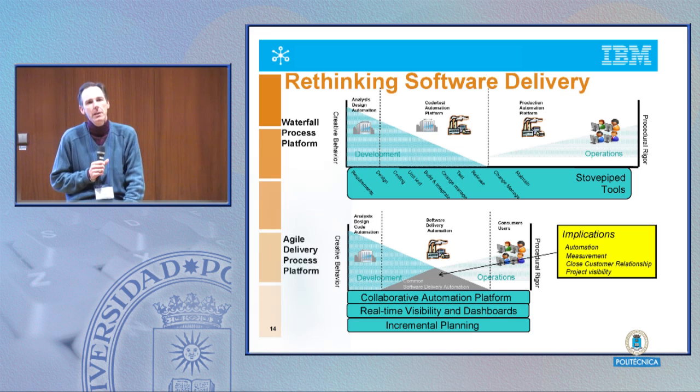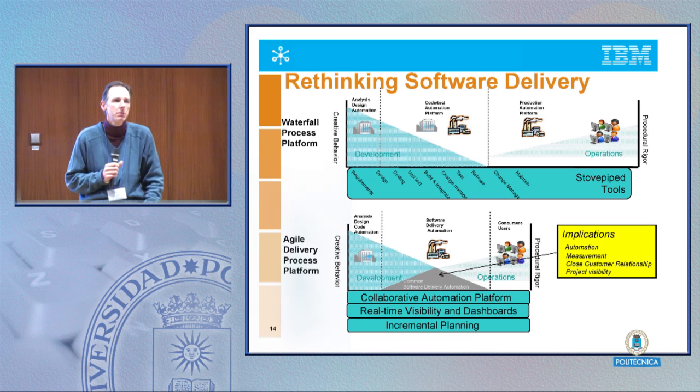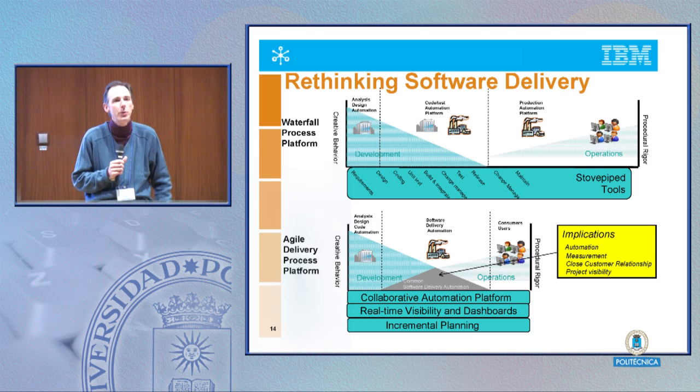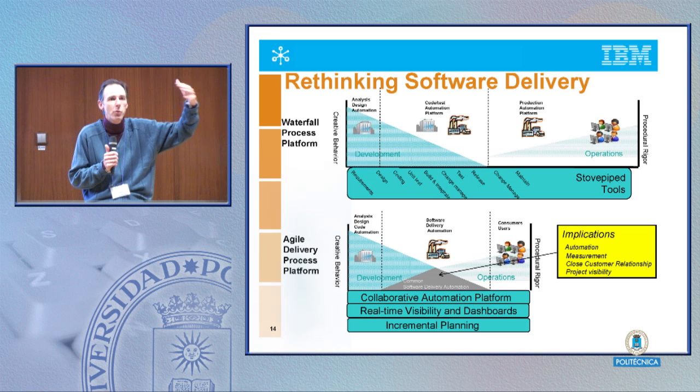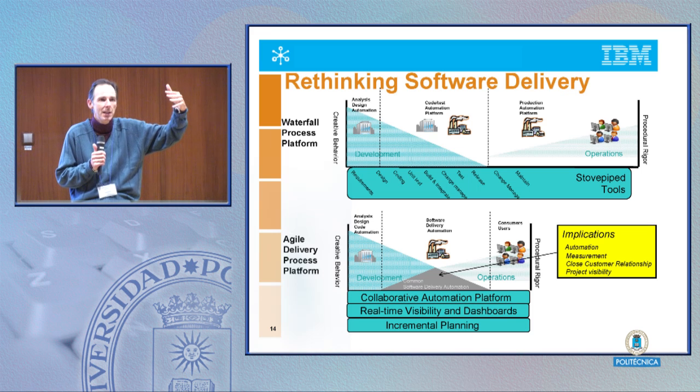Well, if we take a traditional sort of waterfall style view, and most projects that I'm involved with, whether they say so or not, they more or less follow this V model. You do a lot of work up front to understand what you're doing. You then start to do it, and then you test and deliver it based on a series of validation efforts. And that gets you through to the process where you can release. Most projects have that sort of profile one way or another.